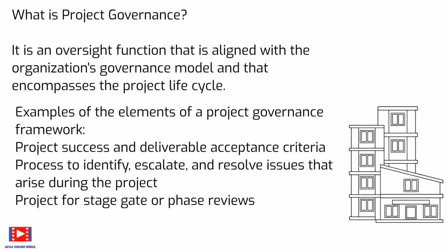Also, process to identify, escalate, and resolve issues that arise during the project are part of project governance framework. Another example could be project stage gate or phase-wise reviews.